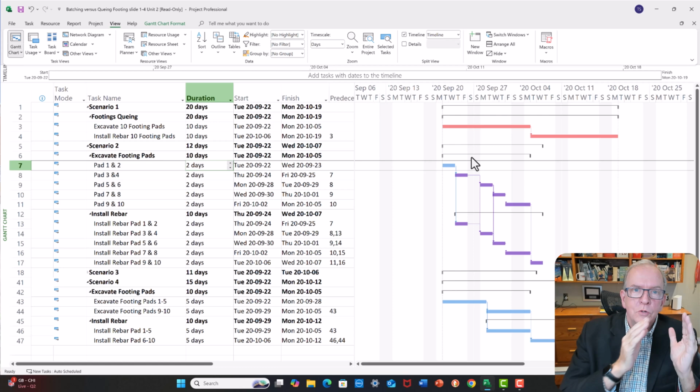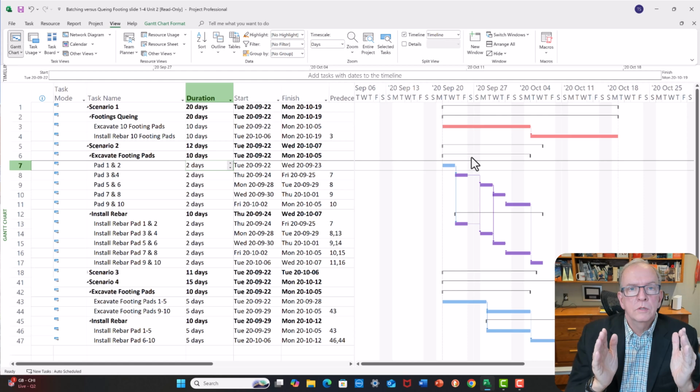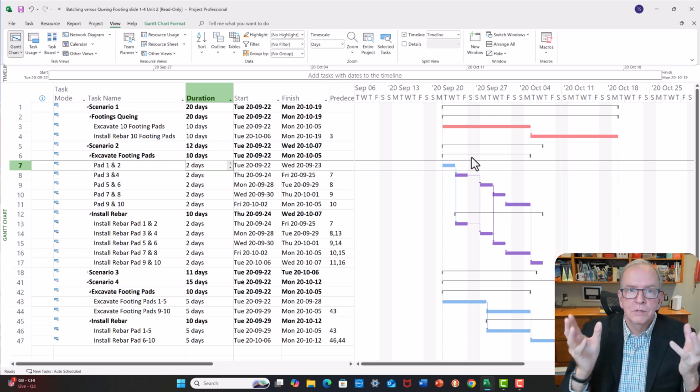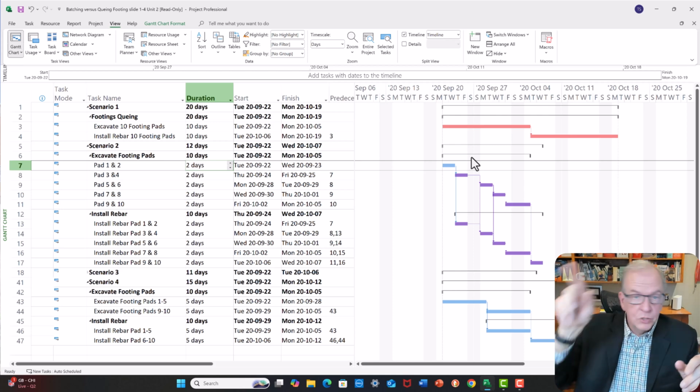Let's do a chapter as one batch. I give you the chapter, you start the copy edits on that. And it dramatically shortens the overall schedule. And we get the permissions done as the early batches are being done. My experience in the past is you do all this work and then permissions comes back and says you can't use this image, you can't use that image. You've got all this rework.